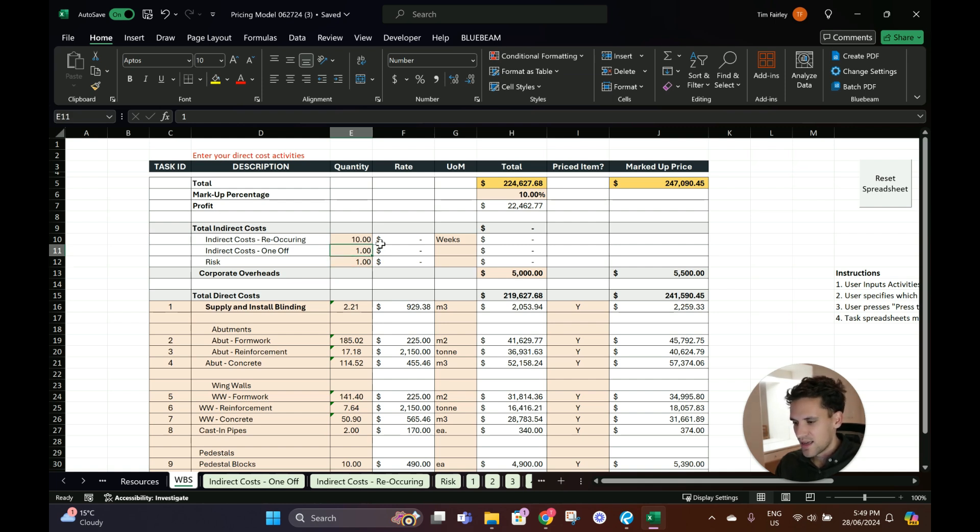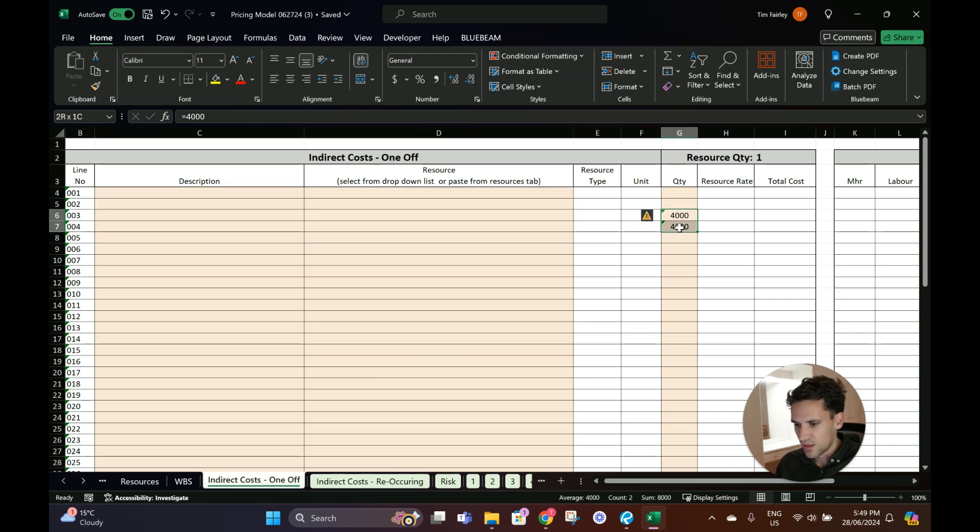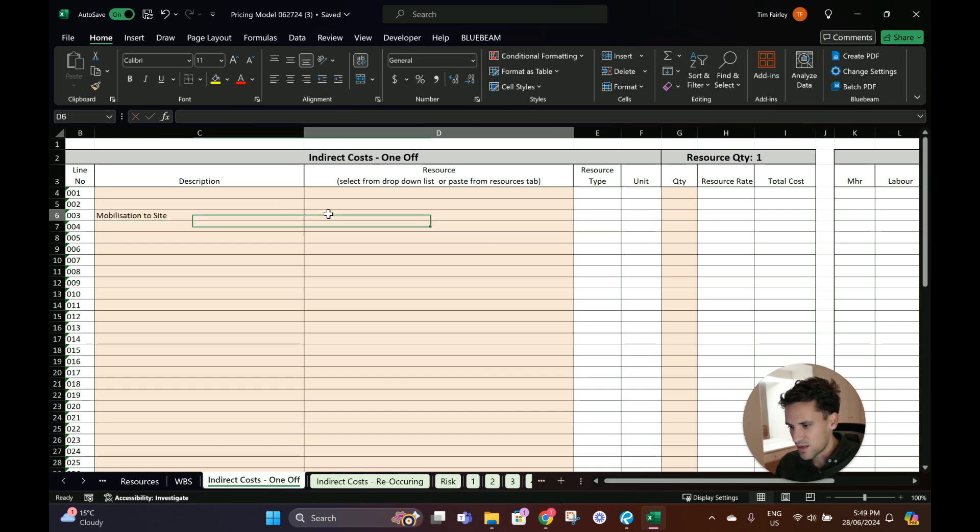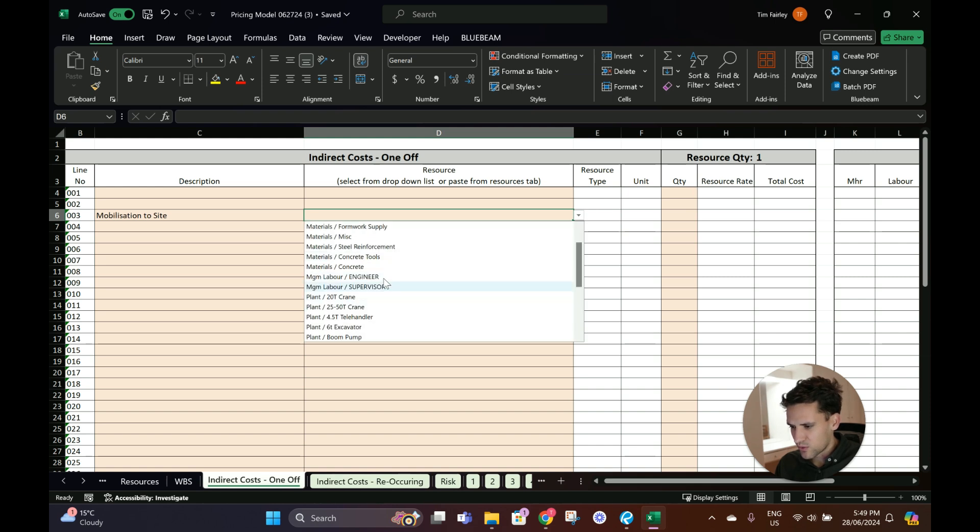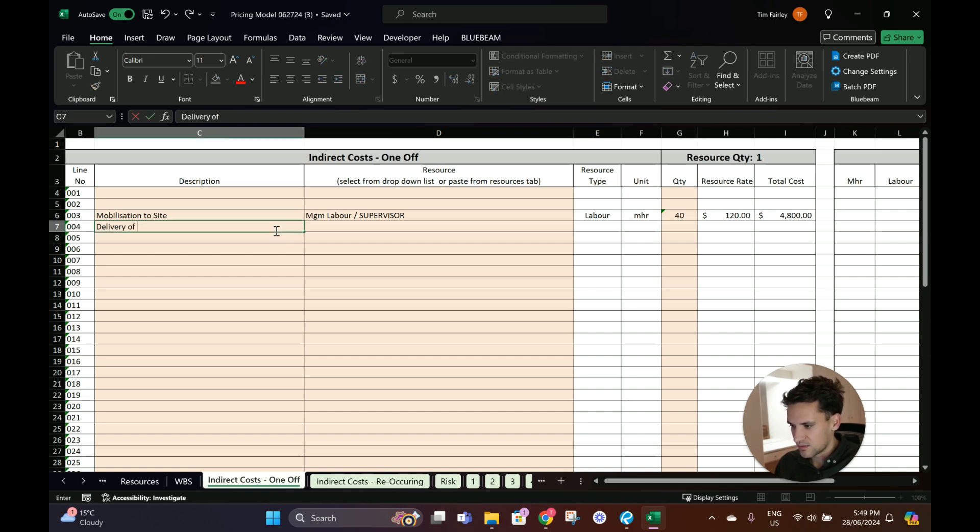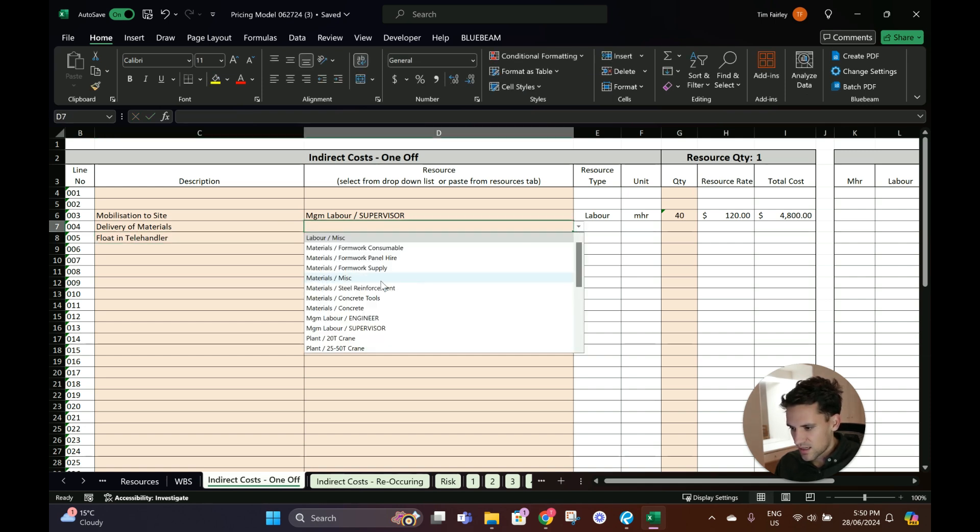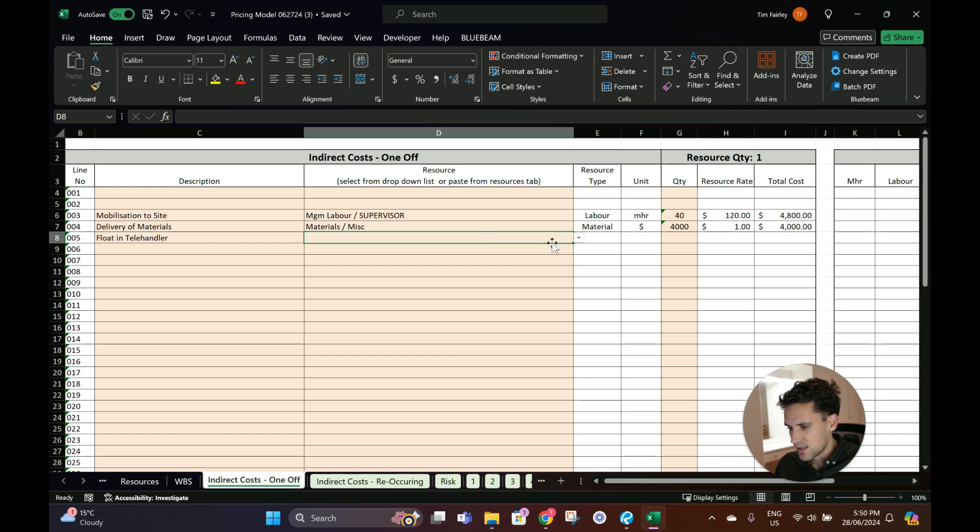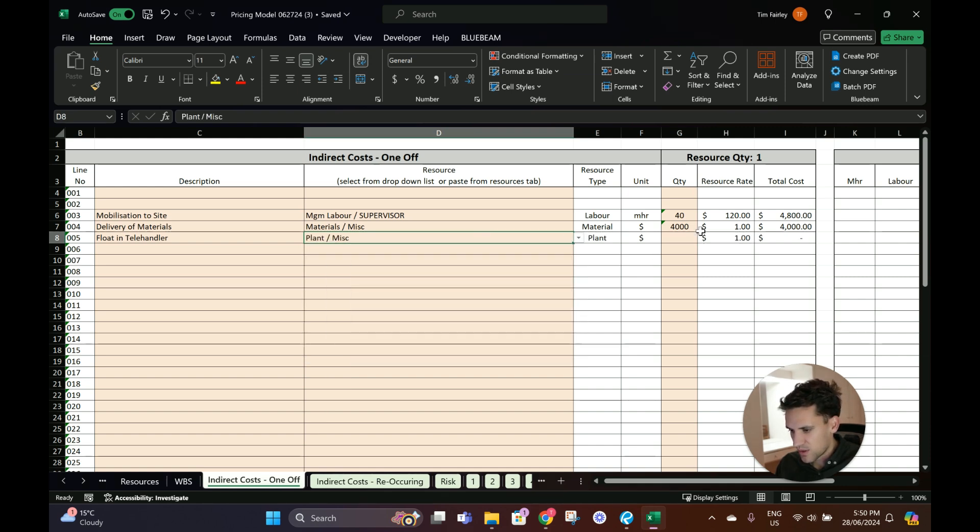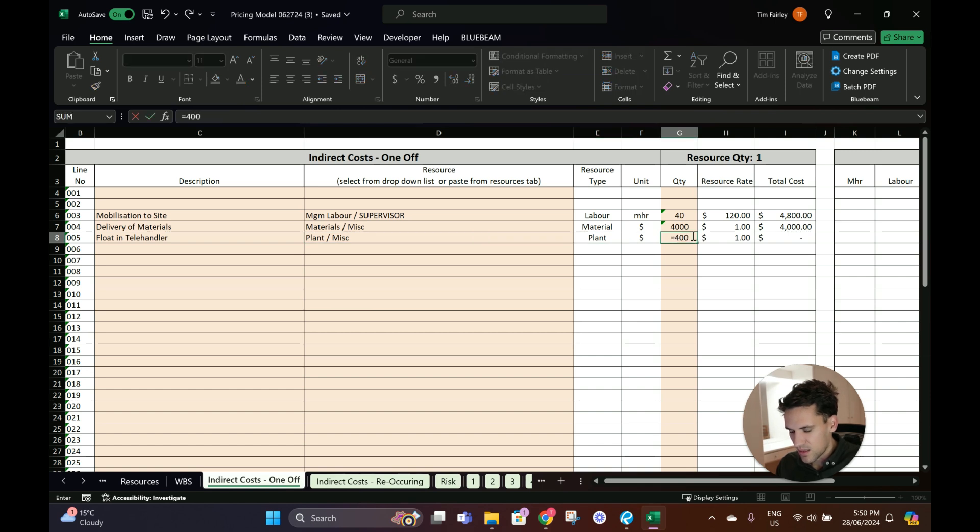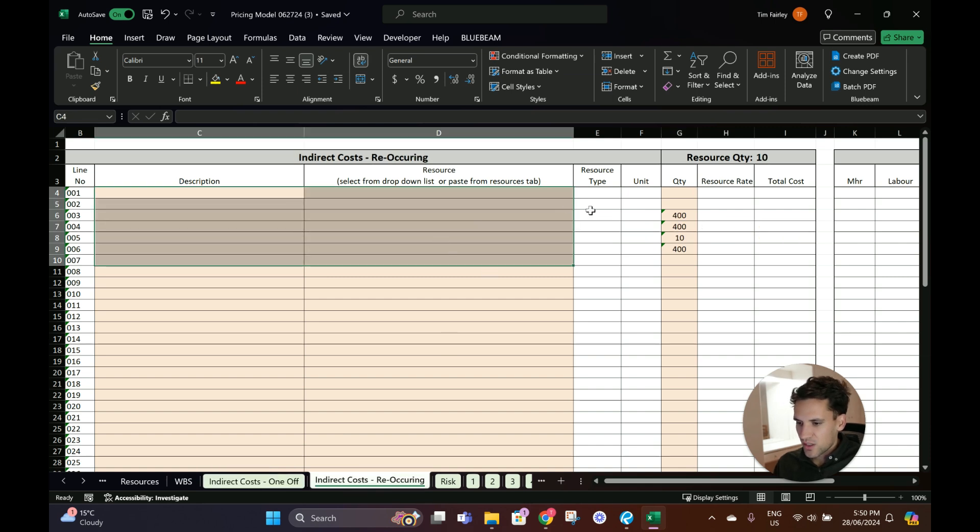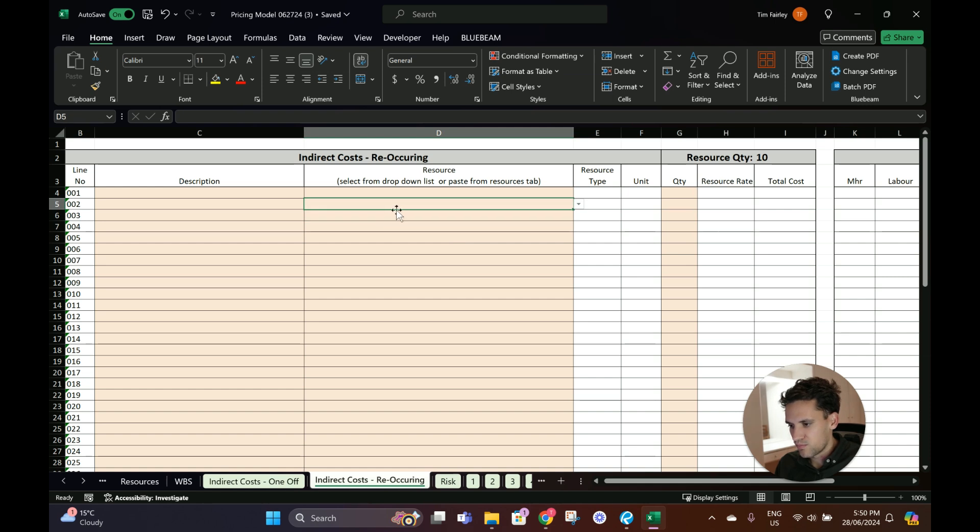One-off indirect costs - we might have mobilization to site. Maybe a supervisor for a week getting everything set up, so 40 hours of the supervisor, and delivery of materials. Float in telehandler - I'll just put that under miscellaneous plant, $4,000. So that's going to be to float in and float out.